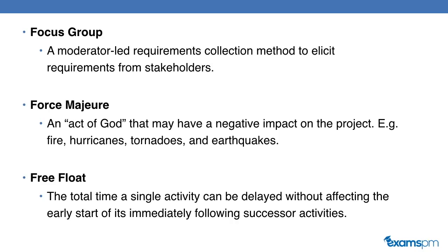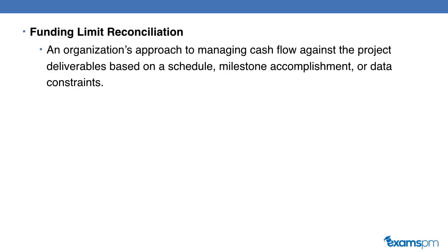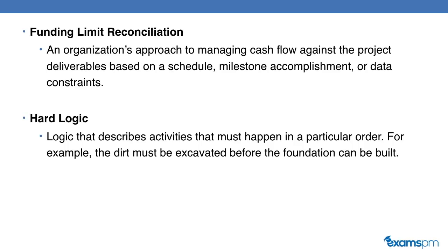Free float is the amount of time a single activity can be delayed without affecting the early start of its immediate following successor activities. Funding limit reconciliation, an organization's approach to managing cash flow against the project deliverables based on the schedule, milestone accomplishment, or date constraints.